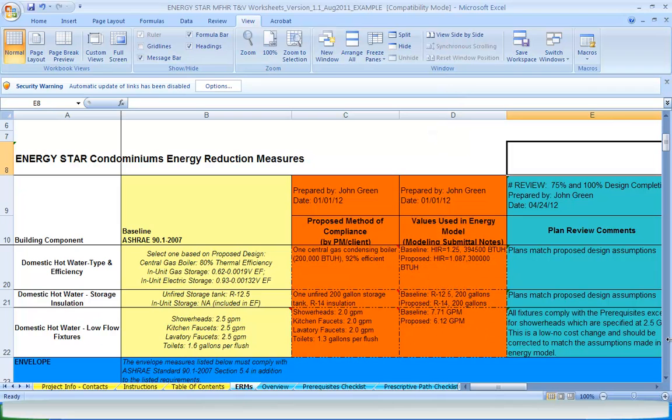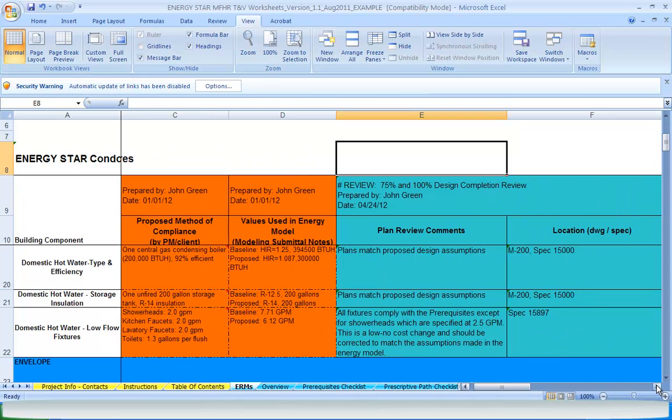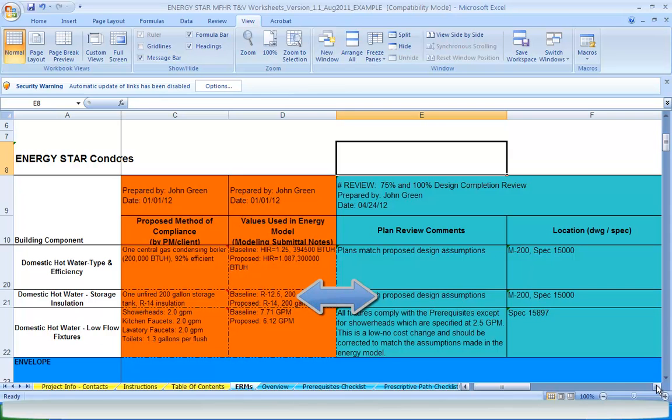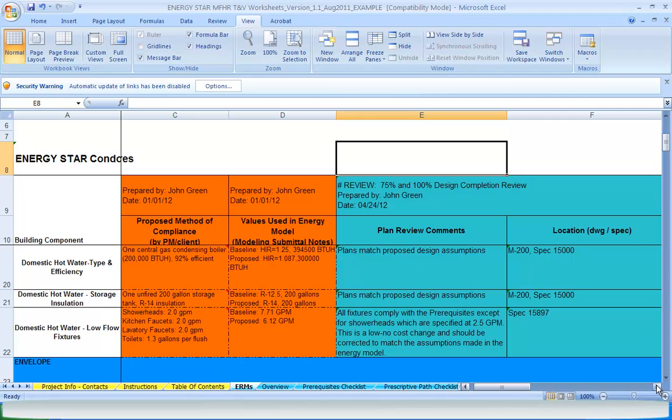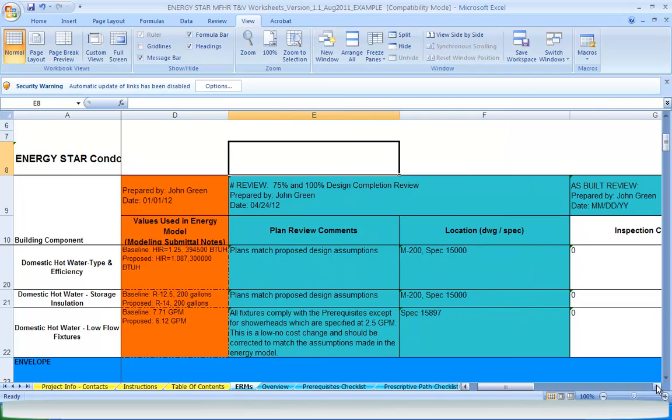The next time this tab is used is after the plan review has been completed with all comments filled in. These should be compared to the previous assumptions to confirm the project specifications are consistent with the proposed design model, or meet or exceed the requirements listed in the prescriptive path. If applicable, the energy model shall be updated where the design does not match the proposed design model to ensure the performance target will be met. If changes drop the model below the performance target, the project will either have to make the necessary corrections or forfeit the ENERGY STAR.